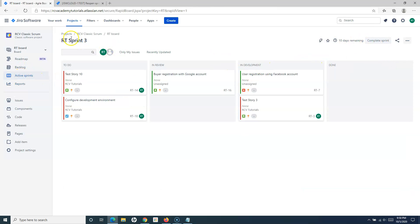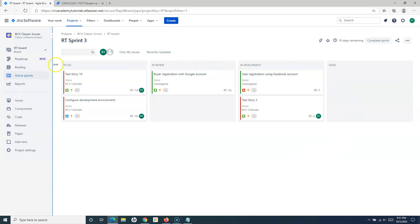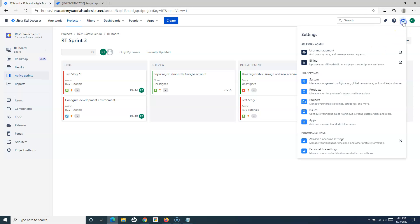If you go back to the project and to the active sprints, you will see that RT Sprint 3 is already active. Because the parallel sprint feature is not activated in this instance, I cannot reopen the closed sprint. One way is to close or complete RT Sprint 3 and then reopen RT Sprint 2, or you can enable parallel sprints.